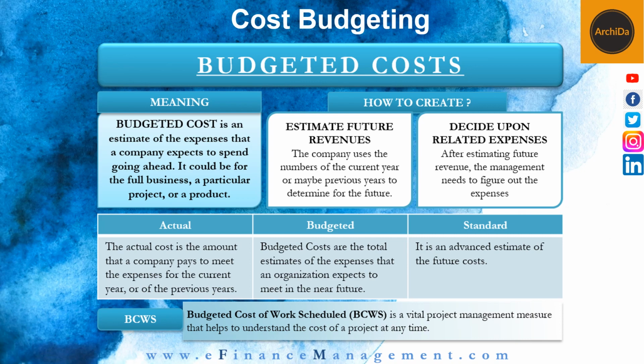Once the project starts, the project budget is a baseline that's used to compare the actual cost versus the estimated cost. Therefore, project budgets allow project managers to quickly understand if their costs are too high and if there's a risk of cost overrun.